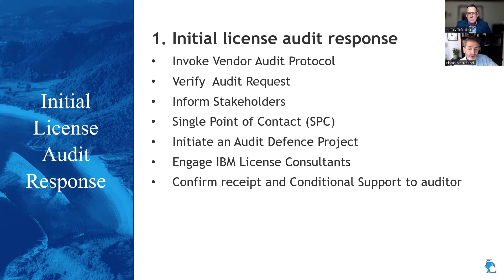Then there's initiating a project. As mentioned, this has quite a significant impact on a business, so you need to put in place the formal structures of a project — there will be a budget, a project manager, a full team. You may have to resource for third-party support as well, so treat it as a project. I strongly advise you engage consultants, because your in-house team will not have the experience a third-party team will. This might be a once-in-three-years event for you, but a licensed audit team would probably have done five this month already. The last piece of this stage is confirming receipt and conditional support of the audit request — let them know you received the message and that you're working on it.